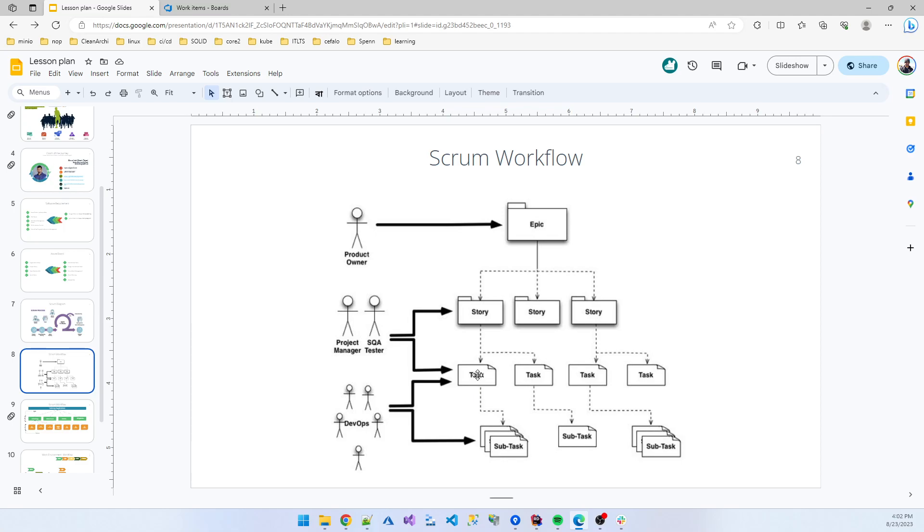For every task you also create some subtasks. Suppose database connectivity subtasks means you're creating some parts: analysis, then start development, then test, then create PR and merge - those are the subtasks. This is the way we manage the Scrum workflow.